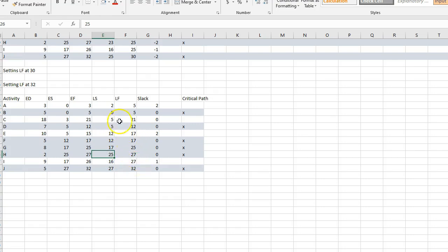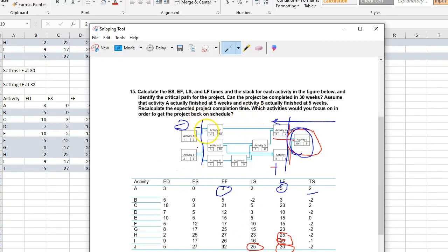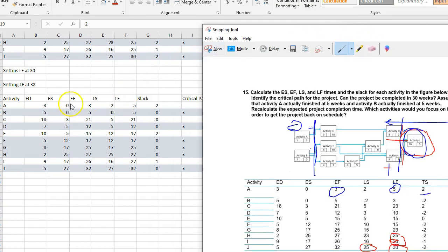And so I've just worked my way backwards up here. And so my late start is equal to my 0 time here. My late start for this activity then is at week 2. Well, that makes sense when I look at this activity right here. So notice it is only a duration of 3 units. So to get to this same spot, that time on a timeline of 5, I don't have to start it until time 2. So that still gives me that time. So that says I have some slack there.